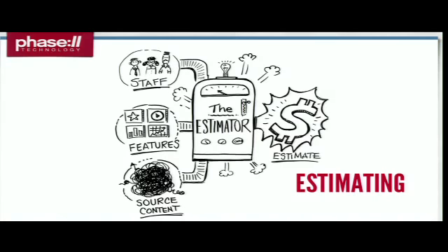So they get out the Gantt chart, and the project manager says, "We think we can do it in this long," and they push that down to the developers. And developers don't get a chance to estimate their own tickets and bring that back up for a reality check. So if you're dealing with a project where maybe your estimation process has a lot of rigor, but the other side of the group doesn't, watch out. That's a sign for failure as well.